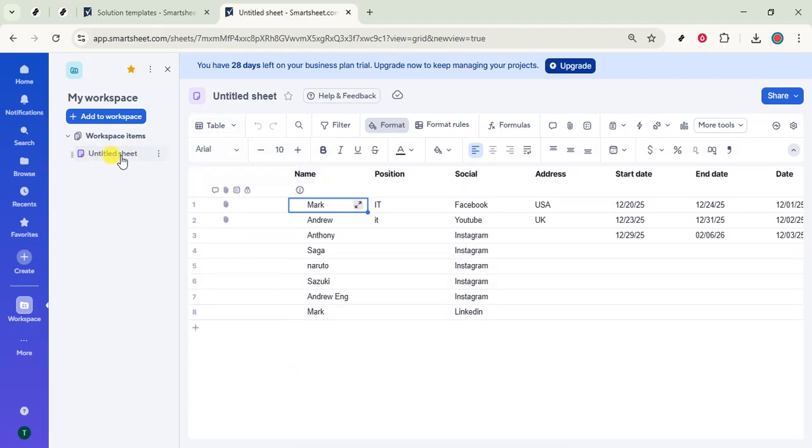This is typically a project plan with columns like task name, start, finish, duration, and predecessors. The critical path feature reads those fields to understand how tasks connect. If some tasks don't highlight later, it's often because they don't have dates, durations, or dependency links tying them into the schedule. With your sheet open, switch the view to a Gantt chart.